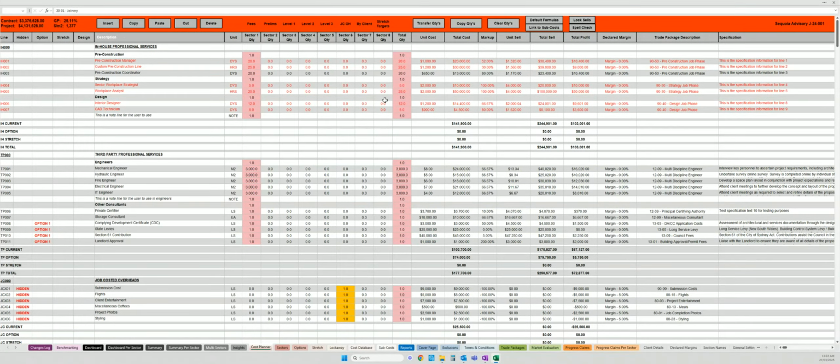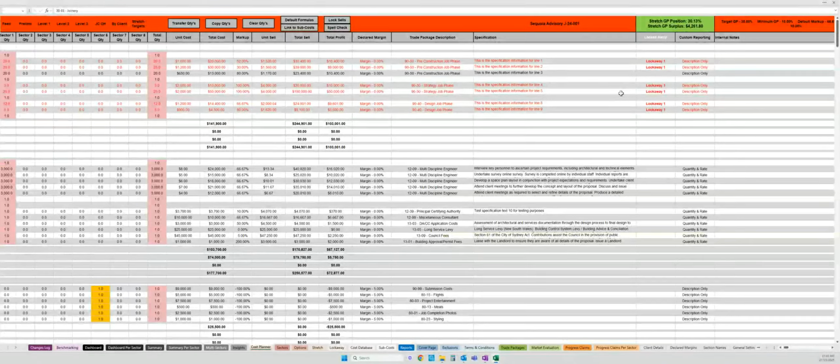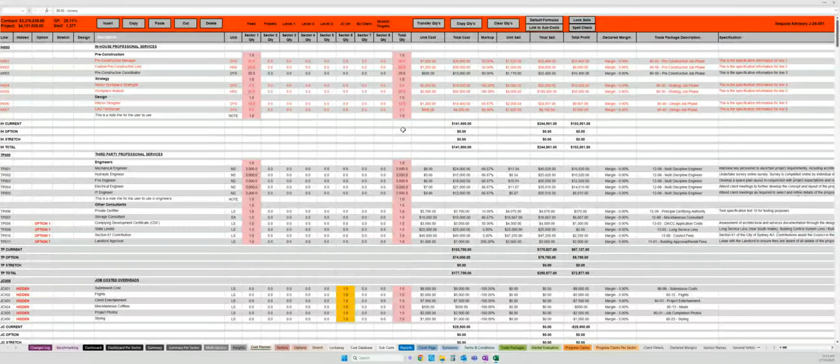That means the line has been contracted, secured, is in your procurement software system, and it is won. We're no longer quoting this work. However, we don't remove the costs out of here because we want to look at the project as a whole, but we have identified those portions of costs have been locked away.